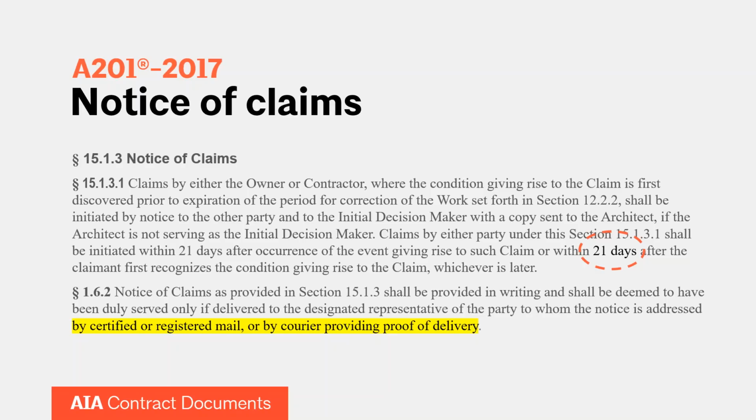So someone's made a decision that we can keep this project moving safely if we limit the amount of trades that are on the job site. And part and parcel with that, I hope that someone is documenting on that project and on all these kinds of projects that are slowed down, not necessarily stopped because of this, documenting all of the ways in which they're delayed. You can only have 2 trades on the site instead of 10. You're certainly delayed in a manner there, and you're probably incurring some extra costs.